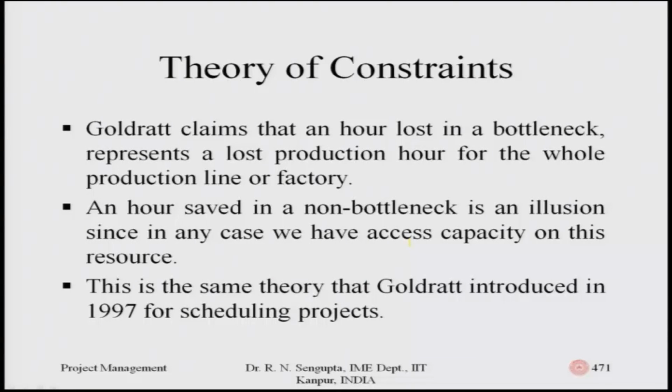Goldratt claims that an hour lost at the bottleneck represents a loss in production, while an hour saved at a non-bottleneck is an illusion, since in any case it will be stopped at the bottleneck. This is the same theory that Goldratt introduced in 1997 for scheduling projects.